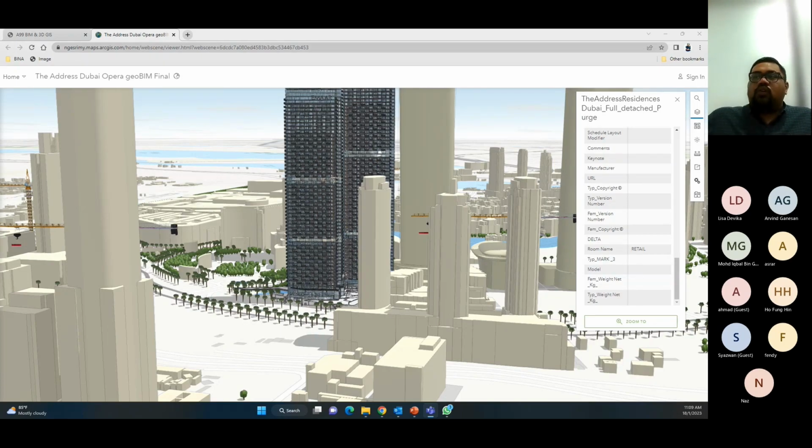Since you are the architect, I strongly recommend three people: one BIM manager, one BIM coordinator, and one BIM modeler. But I think the BIM manager can take the role of the BIM coordinator, so two people are enough. Or if you want to shrink more, one person only: BIM manager, BIM coordinator, and BIM modeler in one person. He runs the entire project.